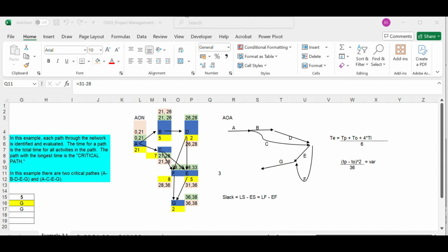We can do a reverse phase schedule. We can even manage this with the float. We can add in a float in the network diagram. When you see an activity with multiple predecessors, you can put buffer for a particular activity that has multiple predecessors. This buffer is called as feeding buffer.